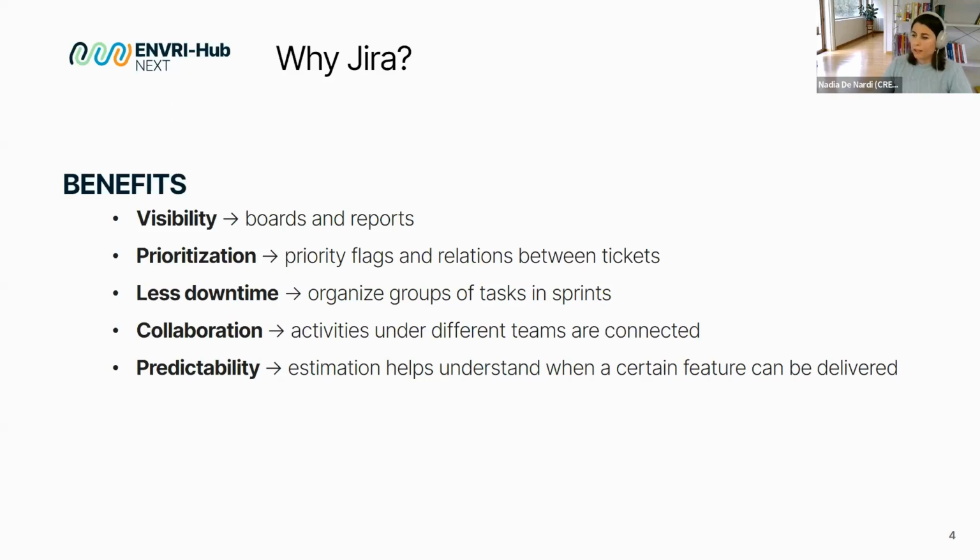Then we have another benefit, prioritization. In fact, we can flag the priority on the ticket itself, so whether it is a blocker, or high, medium, or low priority. And also we can link tickets, like this one is blocked by another ticket, so we know which ticket must be done before, okay? Then we will for sure have less downtime as we work using these sprints.